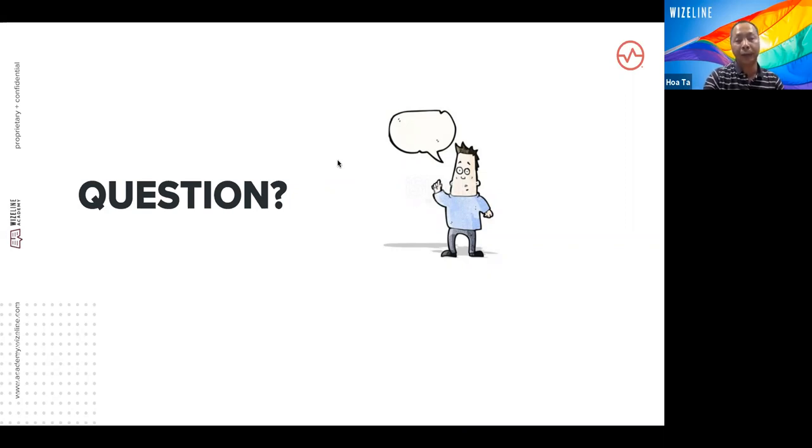The commitment is like, we go with that number and check with the team. Do you feel okay with the commitment we are going to make with this sprint? Do you feel okay with the number of user stories we are going to deliver? Somehow we put too much into the sprint with the velocity number, and then the team feels, no, I don't feel good. I think that we cannot catch that. There's something I don't feel confident about. That means we need to go back to the commitment as well, so we can combine. So the combination of commitment-driven and velocity-driven planning is a good way, Cesar.